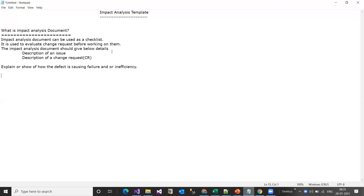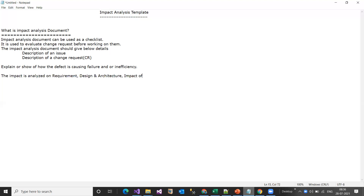The impact is analyzed on requirements, design and architecture, testing, and schedule. It all depends on the change request or bug you are working on. If it involves design and architecture, you need to explain it, as well as the impact on testing and impact on schedule to the client. These are all things that get mentioned in the impact analysis document.